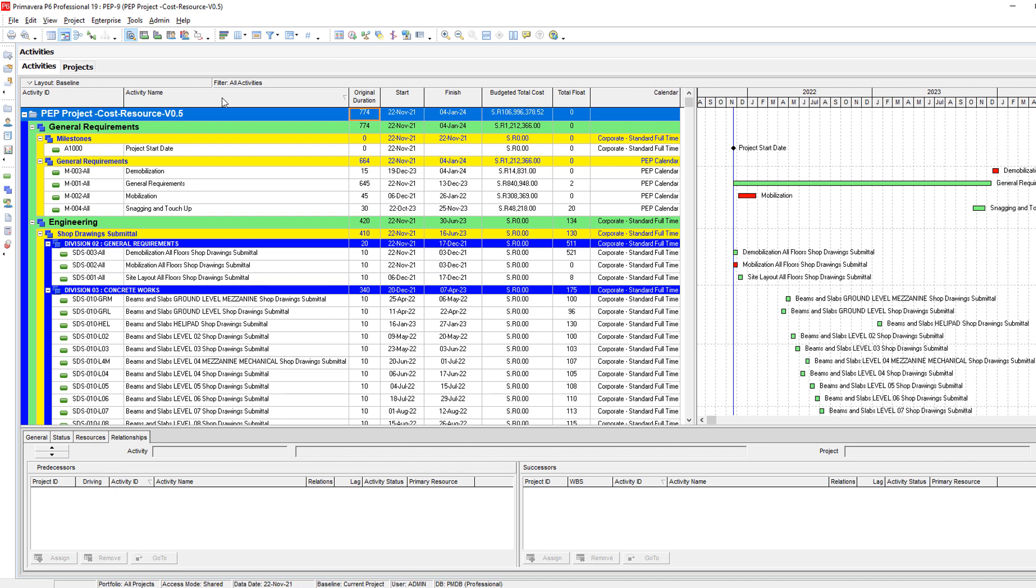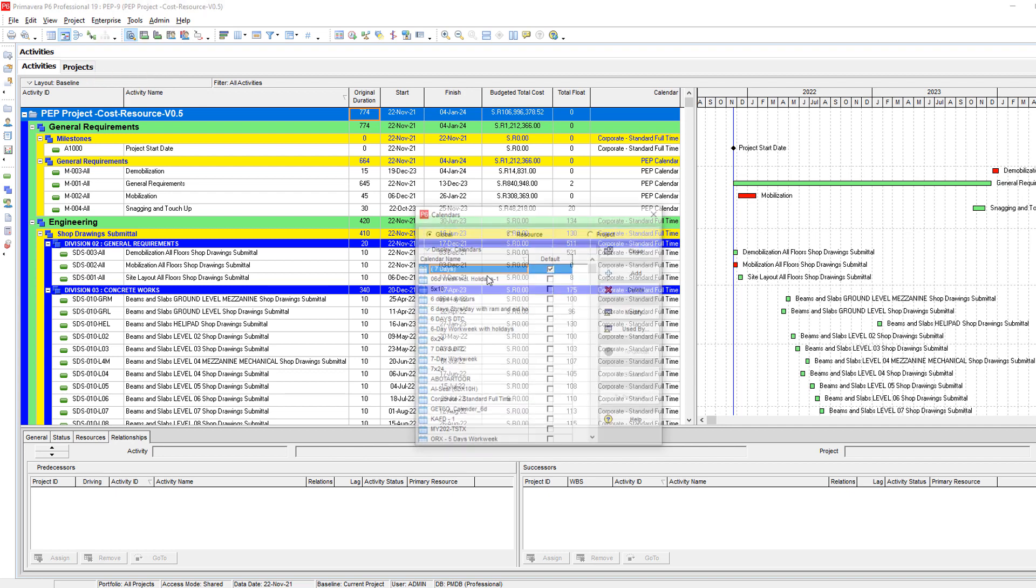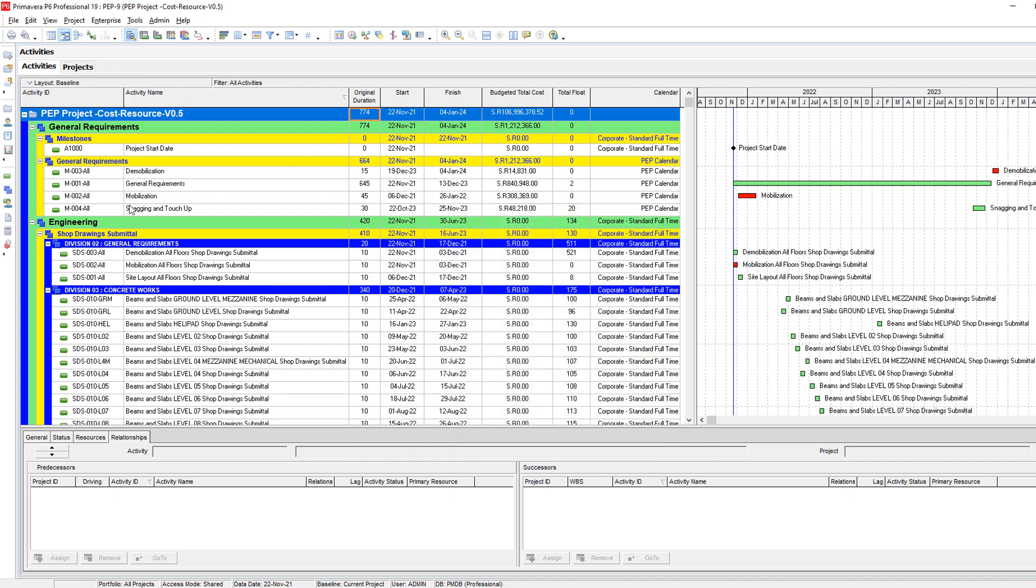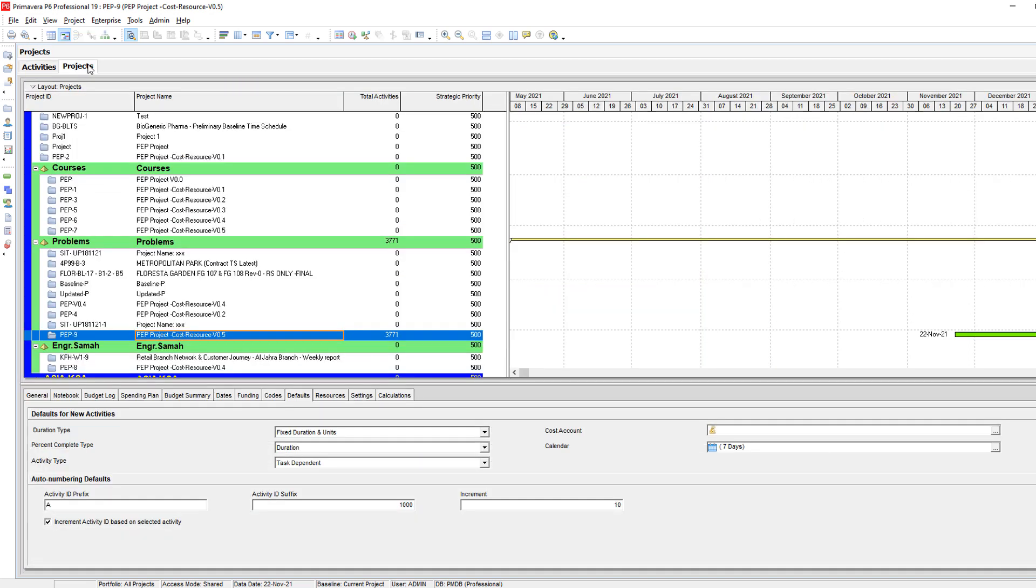The only way to change it is to do these two checks again. Go to your calendars, be sure that your default calendar is 7 days, and then go to your projects and select the project you have. Go to the default tab, and be sure that the calendar default is 7 days. I hope you enjoyed this one. See you in the next lesson.